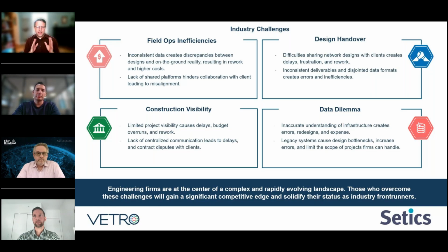And if we just take the handoffs, right? If we just look at the handoffs in that scenario, those themselves take time, which adds cost automatically. But if there are errors or discrepancies in those handoffs, those compound over time and increase the cost of the problem as they accumulate, which exponentially increases the cost of the handoff. So you can see here some of the highlights that we see a lot